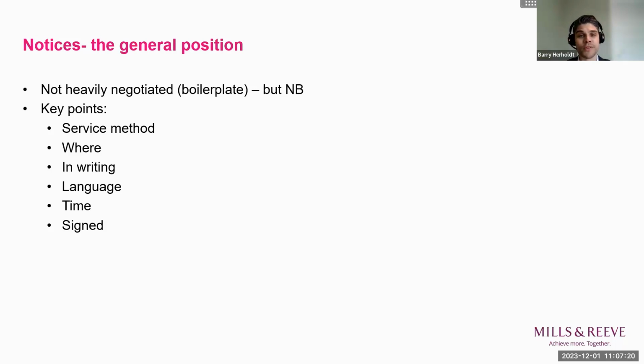The next one to consider is where. Agree an address where the party is required to issue a notice. The aim is to avoid any risk of issuing your notice to the incorrect address. There will be times where parties forget to specify an address in a notice clause. When faced with this scenario, consider if the contract identifies other methods of service, and if so, use that method, or check where statute may apply if statute allows for service by a particular method. If neither the contract nor the statute can assist, use any method that will bring the notice to the other party's attention.